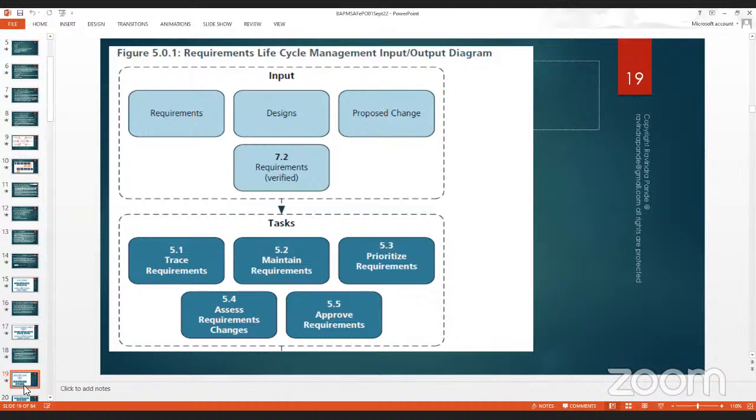And that's why I trace the requirement, to make sure whenever it has been recorded, sanctioned, approved, and moved to the verified requirement list, which has to be developed by the development team at a later stage. And that's why I make a table called the requirement traceability table, or requirement traceability matrix, as it is normally referred to throughout the globe, throughout different development scenarios. So RTM is a standard term for all business analysts or project management bodies, a simple table where I have a serial number, requirement description, requirement inserted point, requirement approved point, requirement verified, and basically moved to the final requirement table. And I normally attach all these timestamps in the RTM itself.